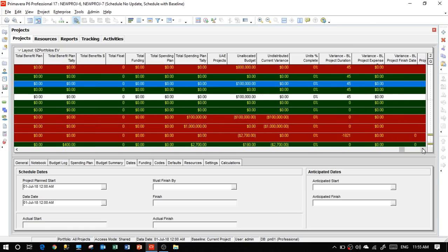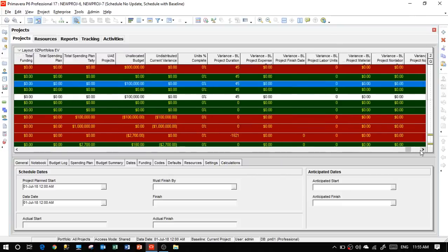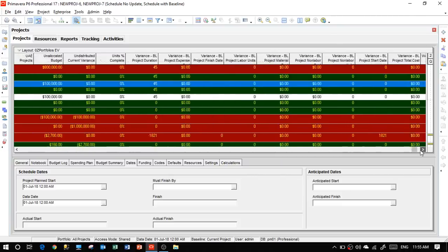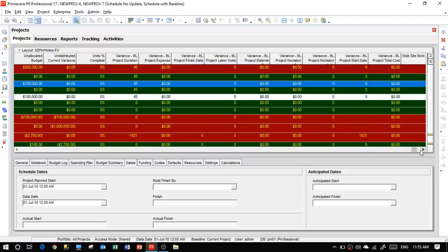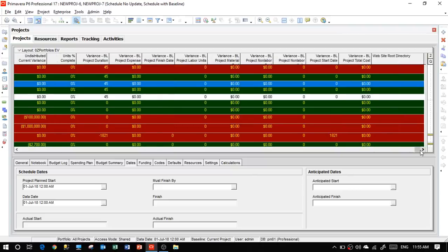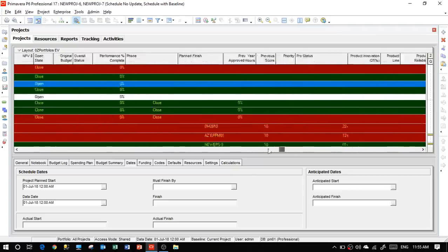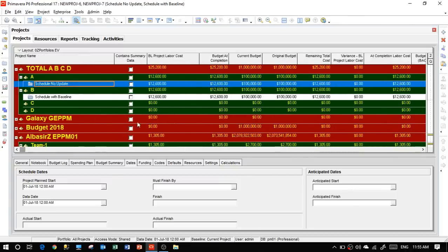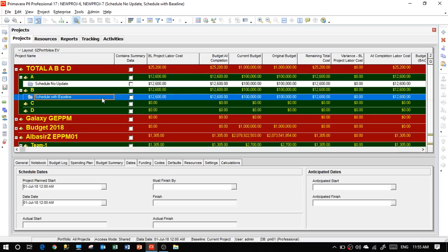Okay. Now, if you notice here, the unallocated budget for the totals is 800 because we have 1 million for all these 4 projects, and we just used 200,000. Okay. Of course, if you want to slow down the pictures to monitor what is written here, you can do it in the video and pause it, but I'm trying to make it fast, so we have a short time for people who just jump very fast.